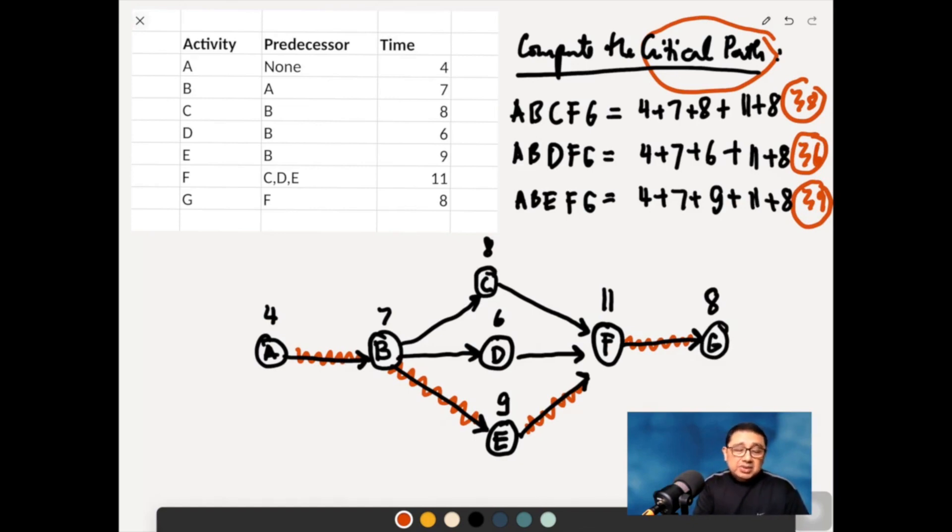So what are some of the implications here? Perhaps in negotiations, what you can do is you take a look at 38 and 39. A, B, C, F, G. There's a difference of 1 here. And this is what you call your slack.